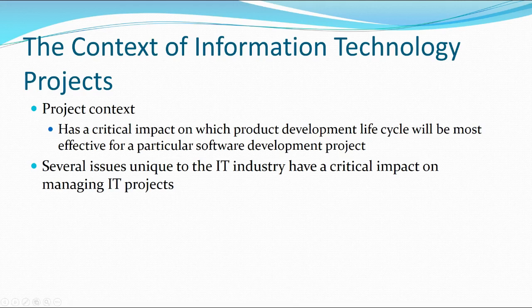When our text talks about the idea of context for IT projects, what we're really talking about is, in terms of the approaches to the systems development lifecycle, which works best. Let me give you an example. If we had a government research project and we are well funded and not under any pressure to produce an experimental piece of software or an experimental device, then a waterfall type systems development methodology might be perfect for our laid back, non-time sensitive environment.